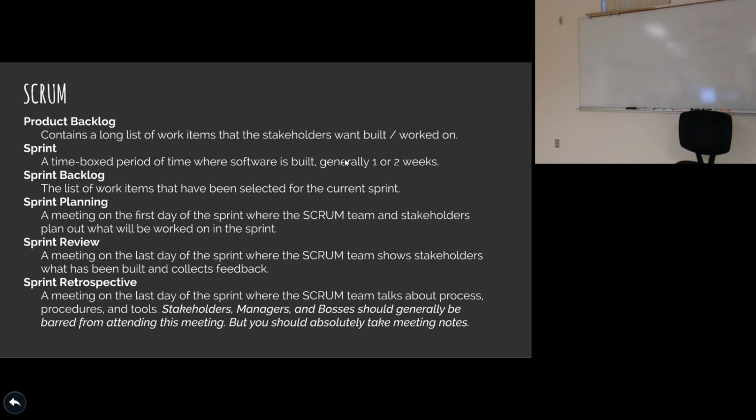So we're kind of doing planning like you saw in Waterfall, but we're doing it every 2 weeks. We've got 2 week sprints, planning out what we're doing, so we're getting things down to a smaller iteration cycle. We're iterating every 2 weeks. The sprint review happens at the end of the sprint. At the end of the sprint, we show our stakeholders what we built, and they say, okay, what do you think? Give us feedback.